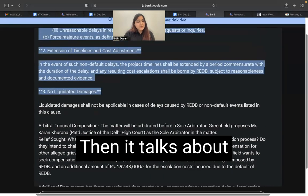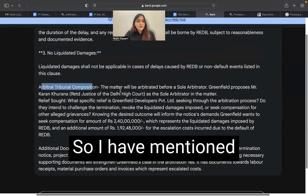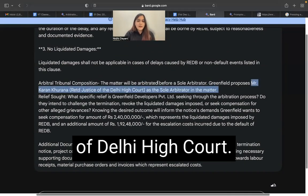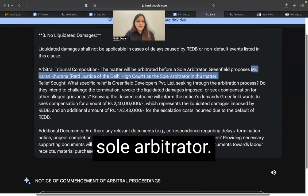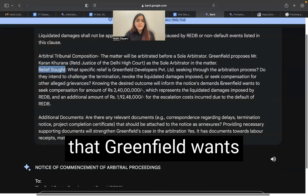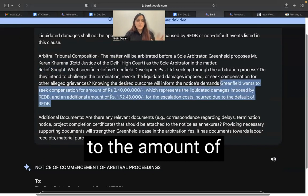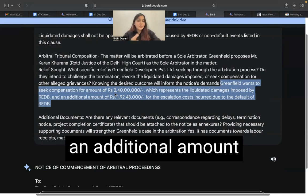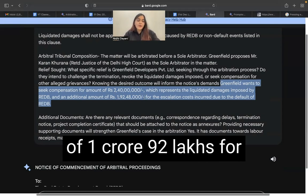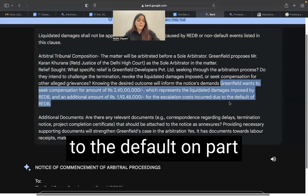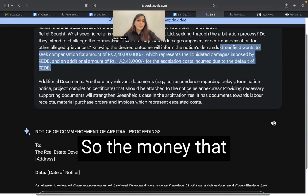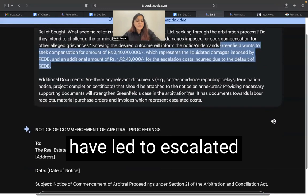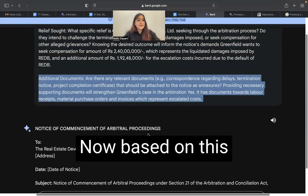For the arbitral tribunal composition, I mentioned that we want to refer it to a sole arbitrator — a hypothetical retired justice of the Delhi High Court. For the relief sought, Greenfield wants to seek compensation of 2 crore 40 lakh, representing the liquidated damages REDB wants to impose, and an additional 1 crore 92 lakhs for escalation costs due to the default of the other party. For additional documents, I provided details of amounts paid towards additional labor costs, material procurement, and other items contributing to escalated costs.